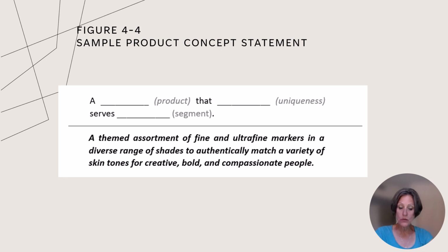Next, the business case is revised to reflect a greater degree of accuracy for the size of the target market, as well as improved estimates for product cost, pricing, and volume. Range of estimates at Gate 2 should be at the plus or minus 25 to 50% level, reflecting initial customer testing of the new product concepts.